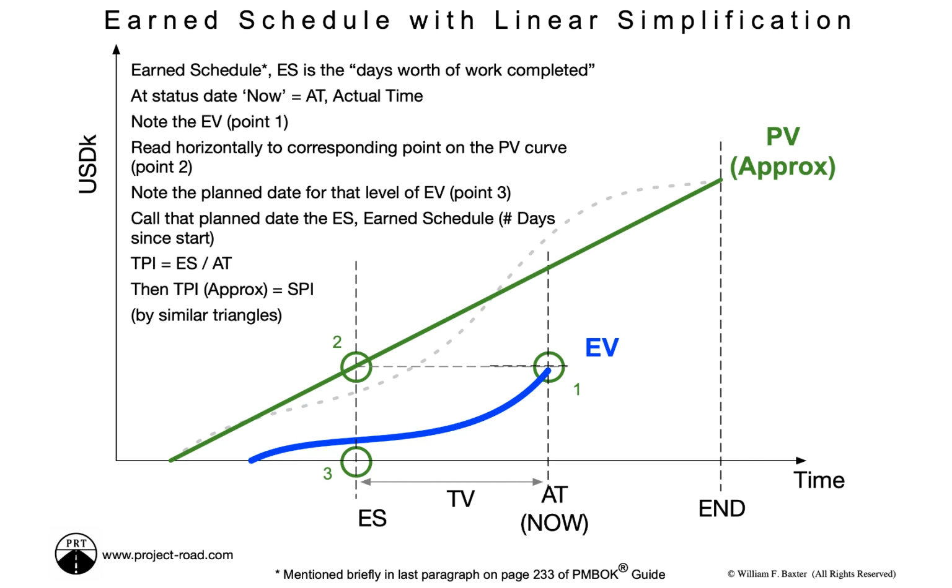So what earn schedule is really doing is it's more accurately dealing with that strong S-shaped curve of the plan value. And if our project has a very strong S-shaped curve for the plan value, earn schedule is probably going to lead to more accurate indices, a more accurate picture of how we're doing with regard to schedule.